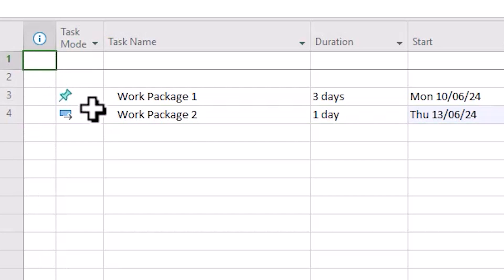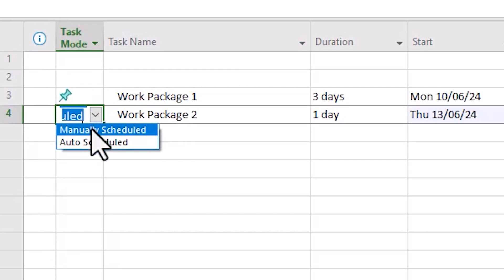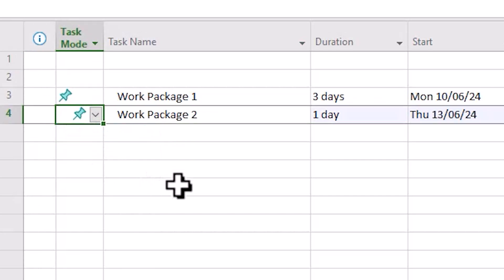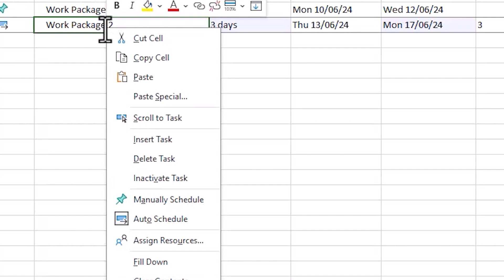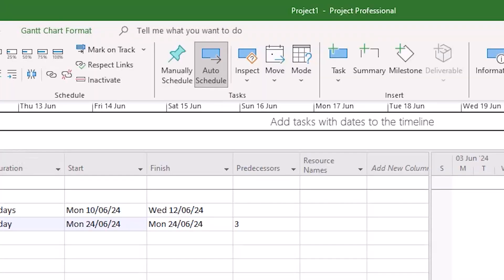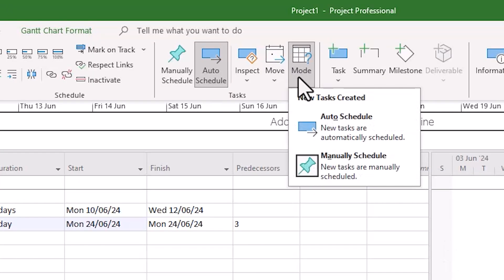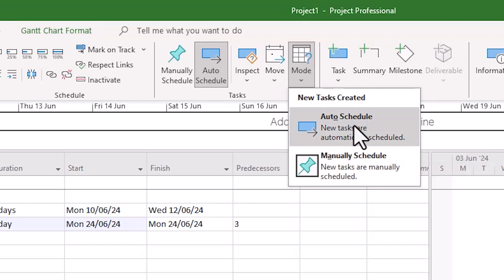Microsoft Project offers many ways to switch between manual and auto scheduling. You can select the option you like per task in the task mode column. You can do it by right-clicking the task and selecting the option you'd like. You can open the task information, in this case by double-clicking the task and switching between the options in the general tab. In the task panel you can choose the option you like and you can select from the mode drop down which sets all new tasks that are created to auto or manual schedule.